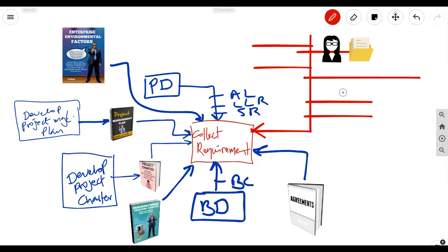And then when you look at that folder, you need to ask yourself, what am I using to gather data? How? Which data gathering tools and techniques? Brainstorming, interviews, focus groups, questionnaires and surveys, benchmarking. What am I doing in brainstorming? Generating ideas. What am I doing in interviews? Collecting requirements from people. Focus groups. What am I doing? Collecting requirements using the focus group. Questionnaires and surveys. What am I doing? Gathering data for those requirements. Benchmarking. Using a previous product as a basis for a current one to glean those requirements. And so on. That is how you need to think about this, okay?